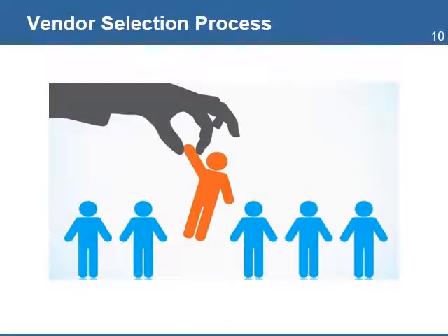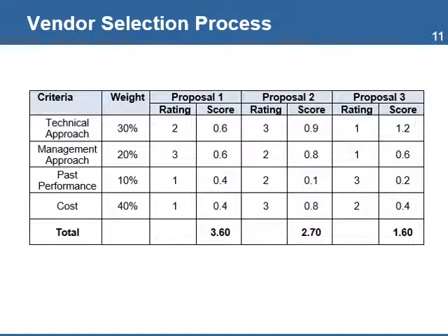Most organizations will have a standard process and criteria to evaluate proposals before they send a formal proposal. The evaluation should help rate or score the proposals. Usually, the method is to assign a weight to each criterion to indicate its importance. Once you have the bids from the vendors, a small team should be organized to review and rate each proposal. This will make the selection process more transparent and ensure the organization selects the best proposal.